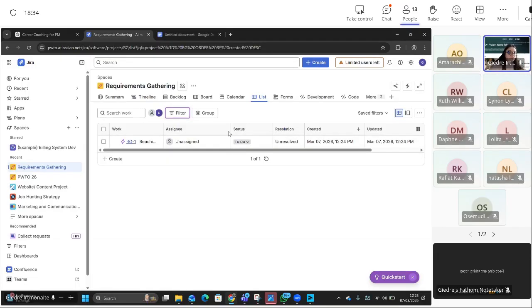However, if we had in our requirements who's looking after each requirement, it gives us a person to ask for updates. Usually I don't put who would own the requirements, but from the journey I've been having over the last few months, I think knowing who should look after the requirements makes it easier to ensure that requirement happens. Does that make sense? I never really put it in before, but now, even when I'm looking at it, they're like, we don't own it, we don't own it. That way you at least know who would own it.